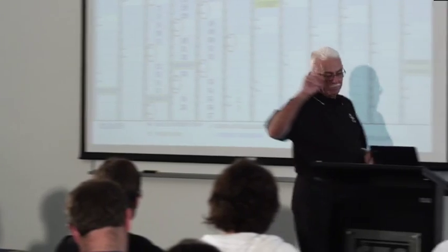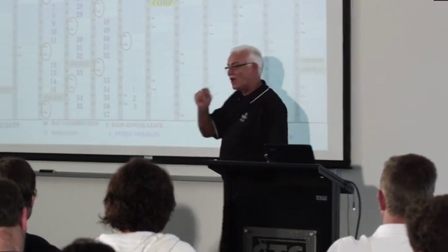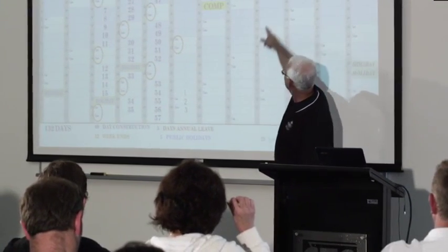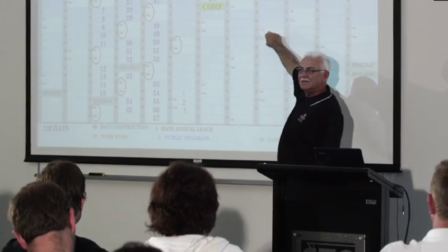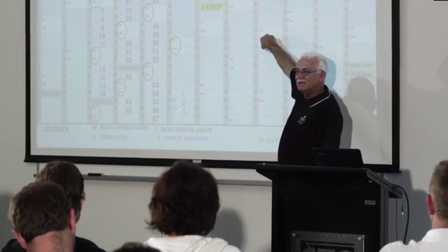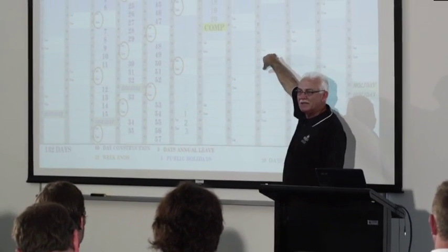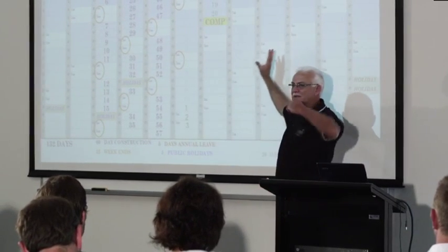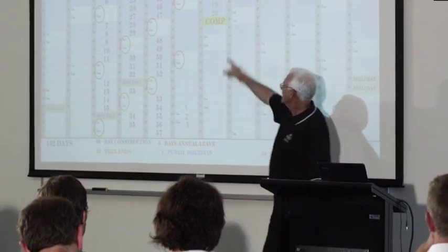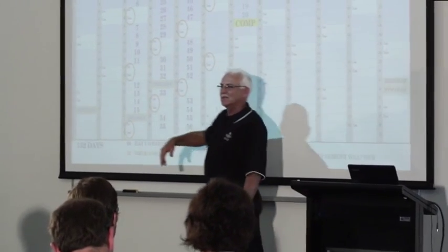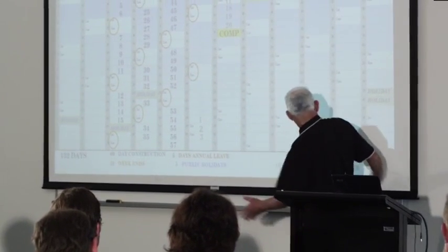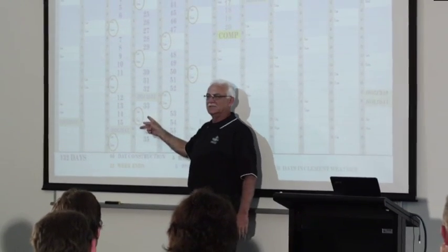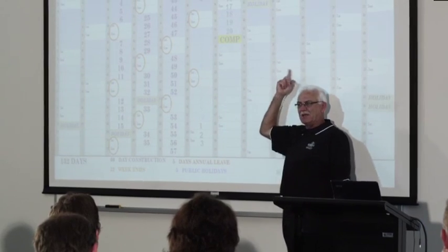Put it in there. But what you're going to do is compensate your completion time. You want $500 a day, my completion time is going to be somewhere down here. So you know that you're not going to get pinged for liquidated damages by having an extended contract. They don't need to know that. Right? You've worked this out without an owner. They don't know. All they know is that you're going to start 7 days and finish 132 days later. All right, so you might start here. Your finish date is 132 days later, which is up here somewhere.